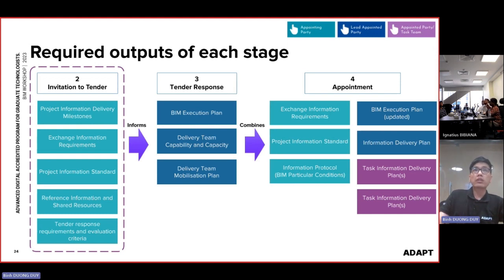So the main contractor is going to give the pre-contract BIM execution plan. But in my case, on the airport project I am working on right now in Delhi, unfortunately the main contractor does not have BIM capability. They don't have the capability to understand or develop the BIM process on that project. So we at SMEC, the sub-consultant, also help the main contractor with the BIM process, implementing and establishing BIM on the project. So we represent the main contractor and give the pre-contract BIM execution plan also.